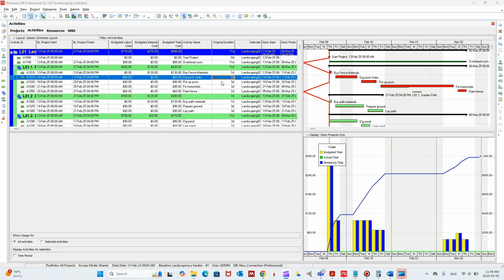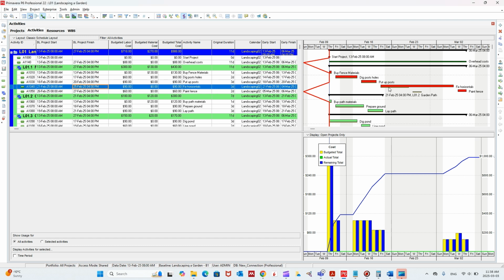of the project. And now one last tip I want to make you aware of is, when you look at the bars here, you can find out, for example, this bar, the one which is fixed horizontally, the original duration is the same, but the activity has been extended from finishing on Tuesday, as you see, until Tuesday the next week, because there was no work in the whole week.